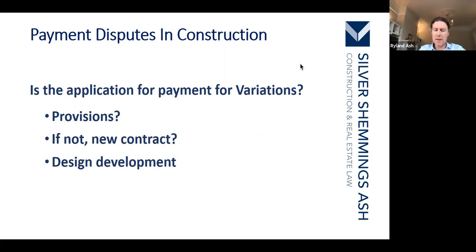These are things that prevent you from changing your position drastically. But if someone's been careful in valuing the work, saying, well, I'll pay these on account, you're not agreeing to the principles, you're just trying to be fair to a contractor or subcontractor, then bear in mind those amounts may be opened up later and may not be so useful when it comes to a final account assessment.